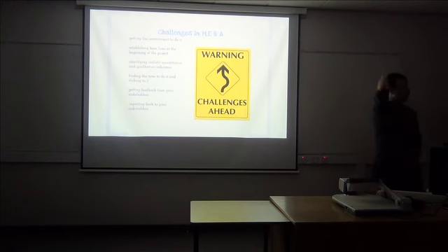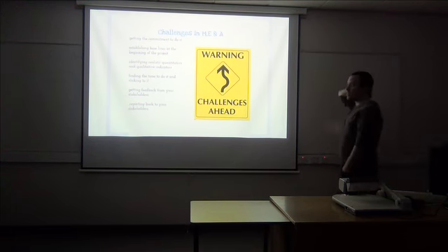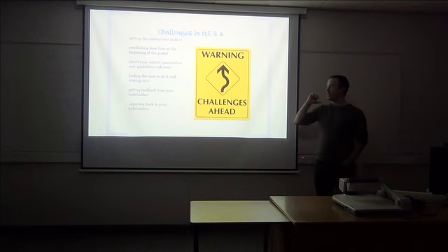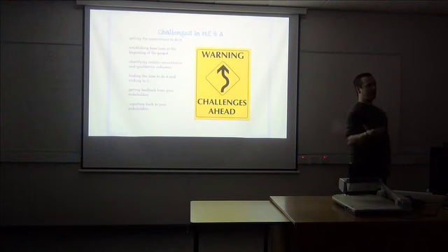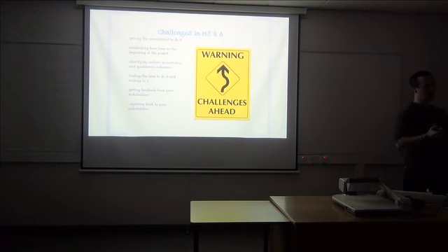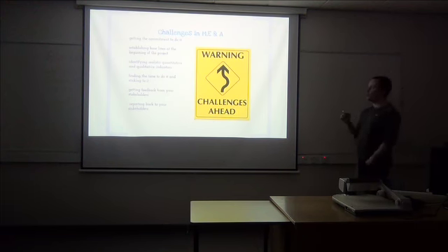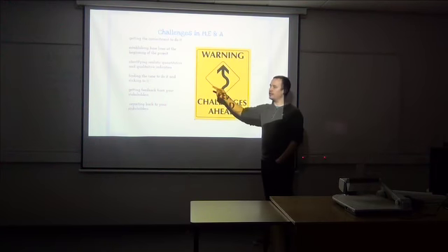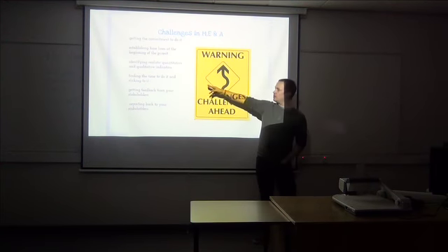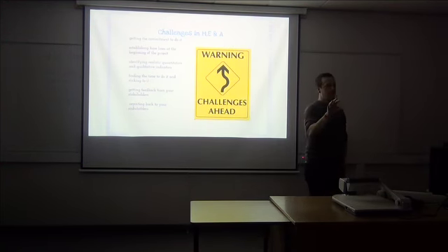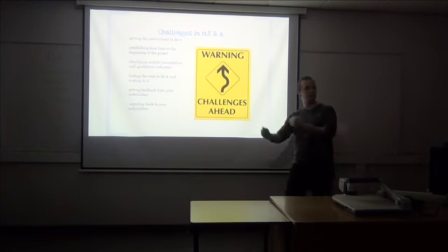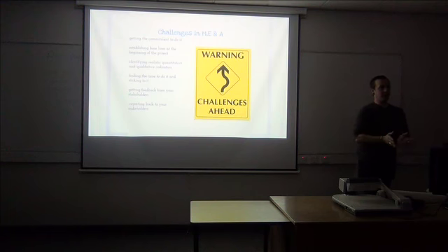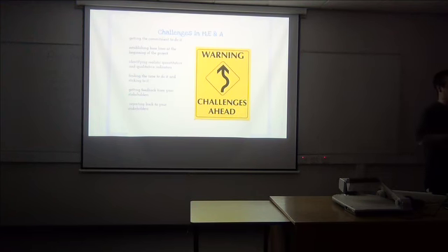You have to identify realistic quantitative and qualitative indicators. We're going to talk about indicators in a minute. So how do we know that we're reducing water or we're increasing capacity? How do we know? How do we come up with those? We need to find the time to do it and stick to it. So again, I've been in projects before where we've had monitoring phases quite clearly put in, but we're running a bit late and the project's got to be delivered, so maybe we'll just forget about the monitoring and we'll just keep steaming forward. That is classic when projects fail. Okay, you should always take the time to stop and have a look. Don't just carry on blinkered.